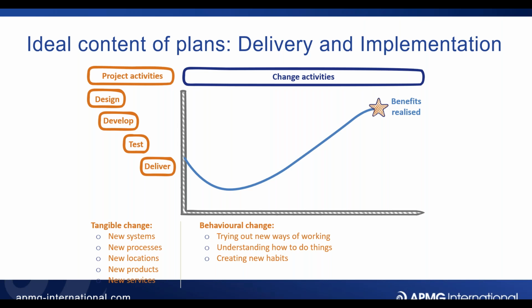So what we need to do is make sure in our Agile plans that wherever possible, we're bringing these two worlds together. So if I've got people who are developing the portal for me, then at the same time I want to make sure that we're also putting in place the change activities. On this slide, I've shown them as two separate things. But of course, what I want to do is merge them so that at the same time we're doing the project activities, we're doing as much getting used to the new ways of working activities as we possibly can, so that we don't get out of step.